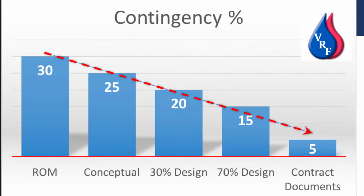As a design progresses, the contingency factor can be reduced because you're getting more detail and definition of the design, which you can put accurate costs to. The construction contingency is to cover unanticipated or unpredictable costs that could occur during construction and after you have signed a contract.